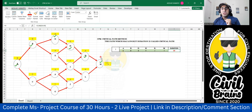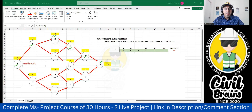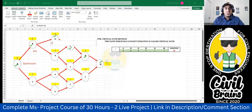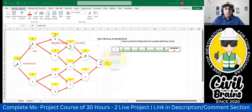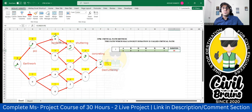Practically, this path A → B → D → H → K → M can represent: earthwork → PCC → reinforcement → shuttering → concreting → de-shuttering. So if you follow this sequence of activities from earthwork to de-shuttering, it requires 30 days to complete.